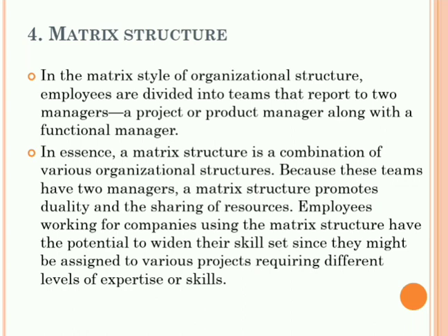For instance, we can say that the strong matrix organizational structure has some similarities with the projectized organizational structure, in the sense that the project manager is responsible for a project. If the organization is running a weak matrix structure, then the project authority would fall into the hands of the functional manager, as it is in a functional organization.